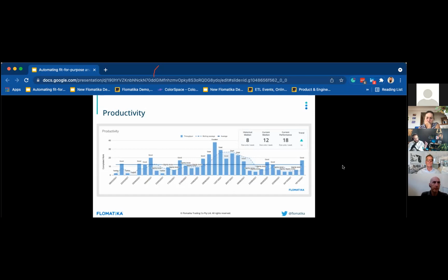So you understand, based on the median throughput, where you are slightly under, where you're slightly up, or where you have really outperformed in one of those periods. So that's really important. But again, how do you look at scale? Because what throughput means for different teams in different tools, in different workflows might be completely different. But this is putting it all together at a value stream level.